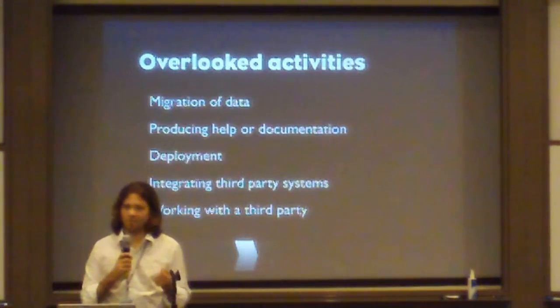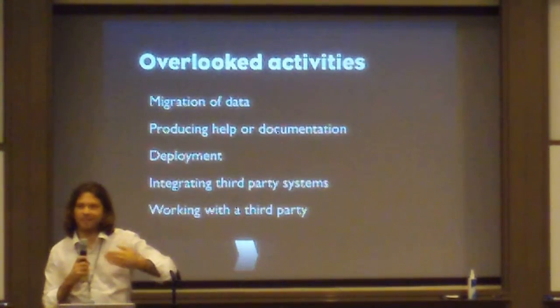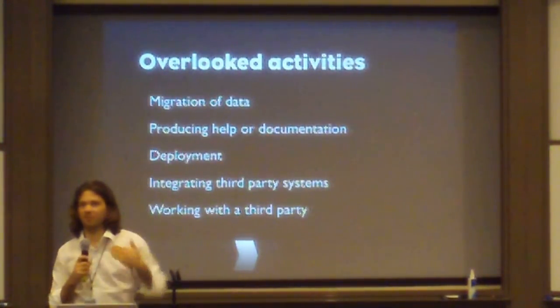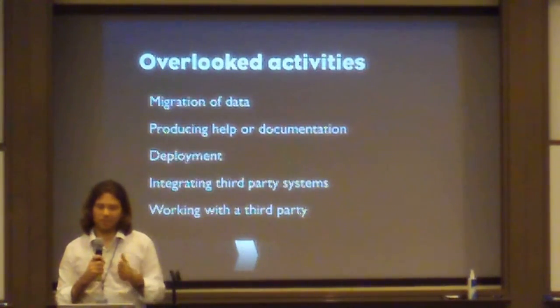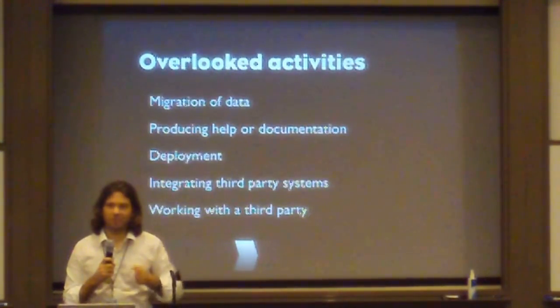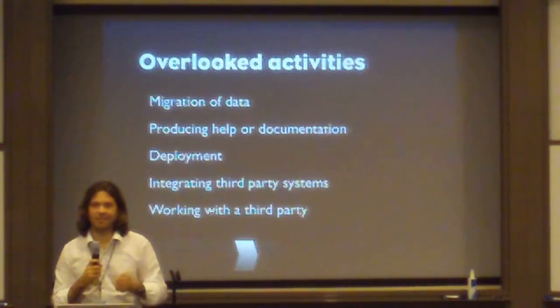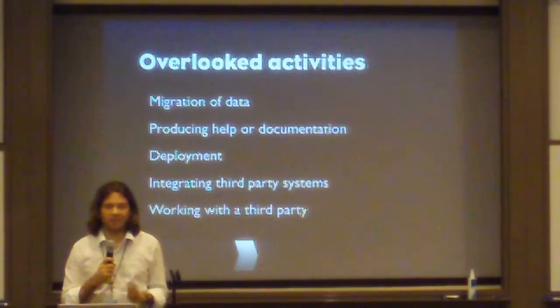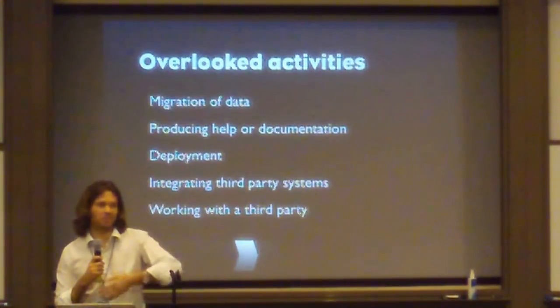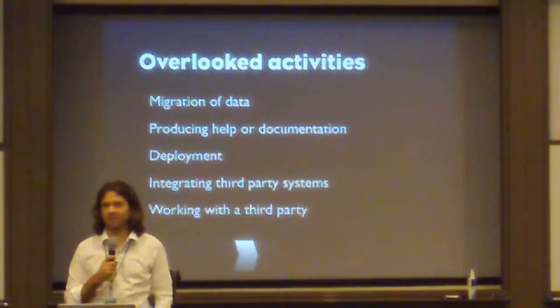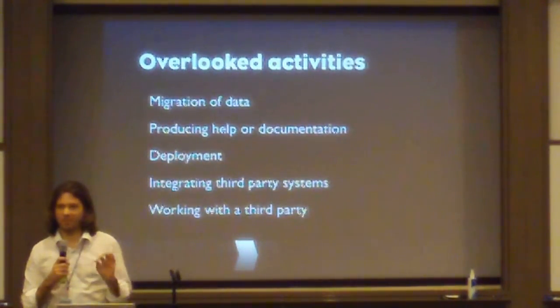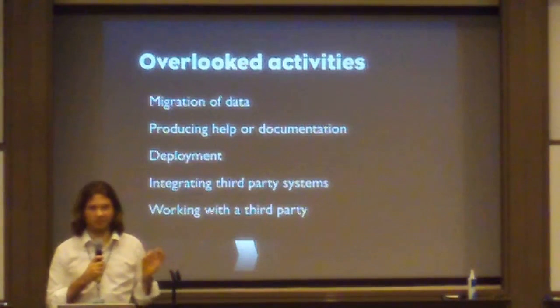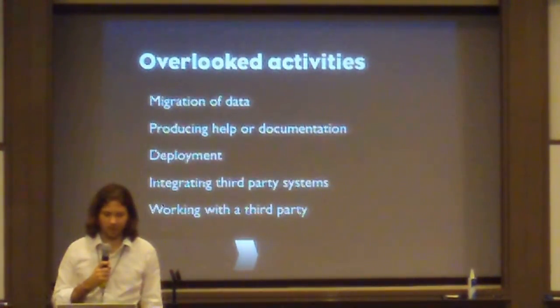And there's a good reason for that, because usually the time it takes to do something depends on the quality of data the client provides. If you put it on a running account, the client will work hard to provide data to you, which takes less time for you to implement. If you take all the risk, they can just hand you whatever they have, and it's not their problem. So that gives them an incentive, a reason to provide good data and keep the process fast and flowing.